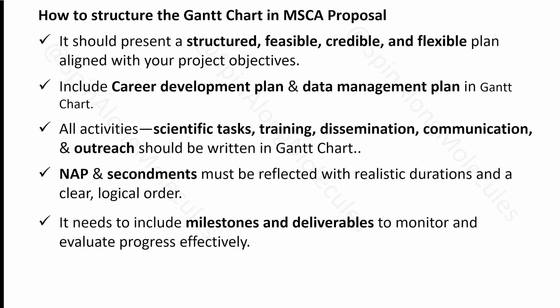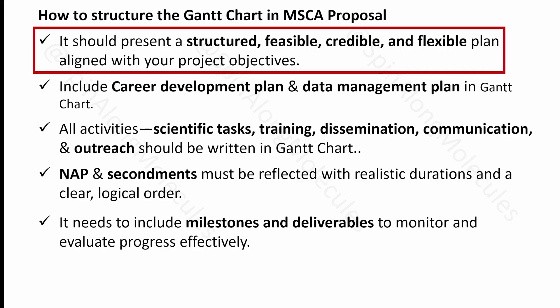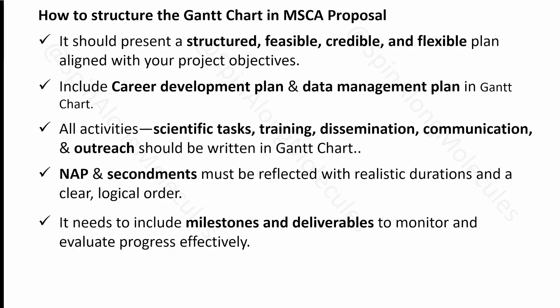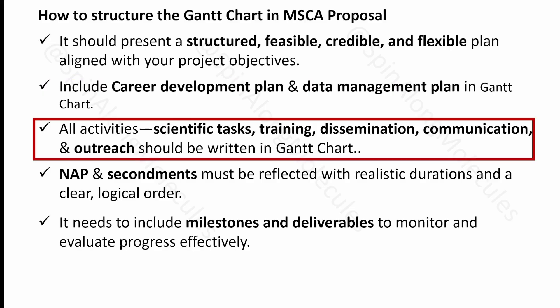How to structure the Gantt chart in an MSCA proposal: it should be structured as a feasible, credible, and flexible plan aligned to your project objectives. Also include a career development plan and data management plan in the Gantt chart. I have seen some proposals that don't include these, but the guidelines clearly state they should be there. All activities — scientific tasks, training, dissemination, communication, and outreach — should be clearly written in the Gantt chart with their start and end months.